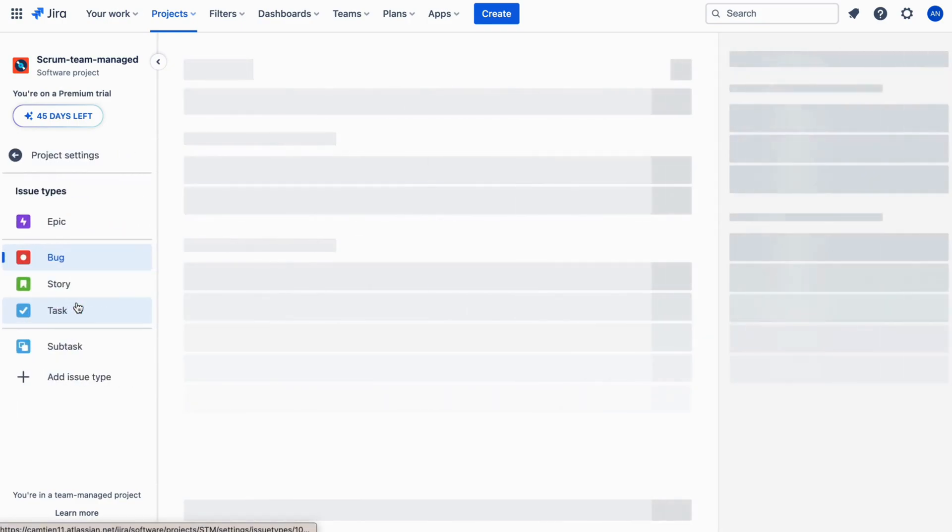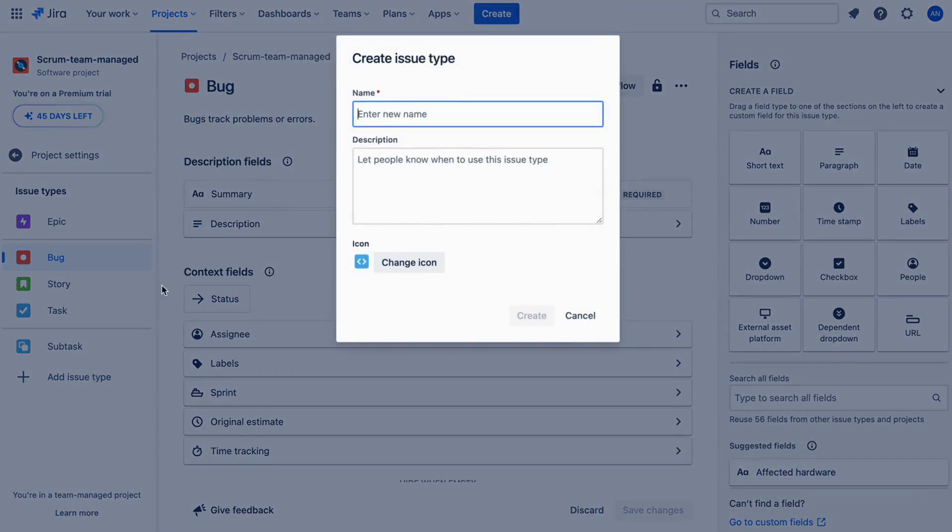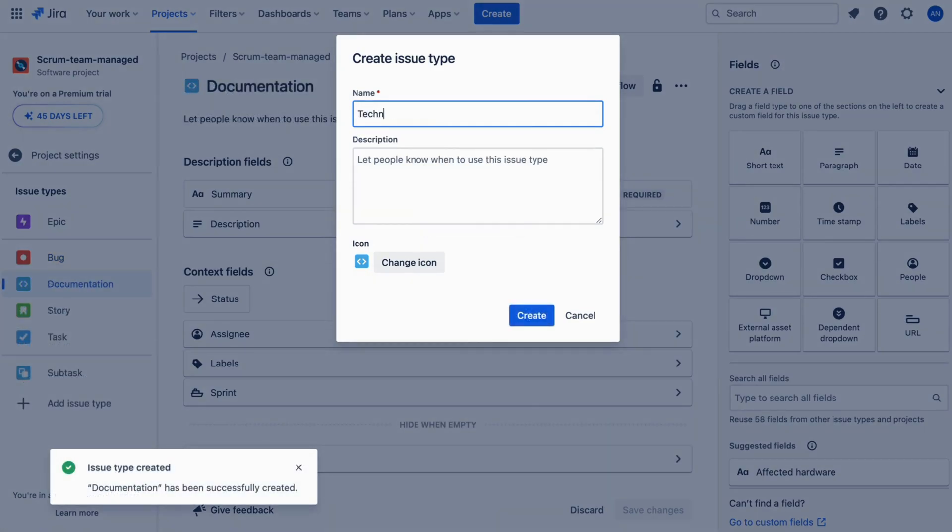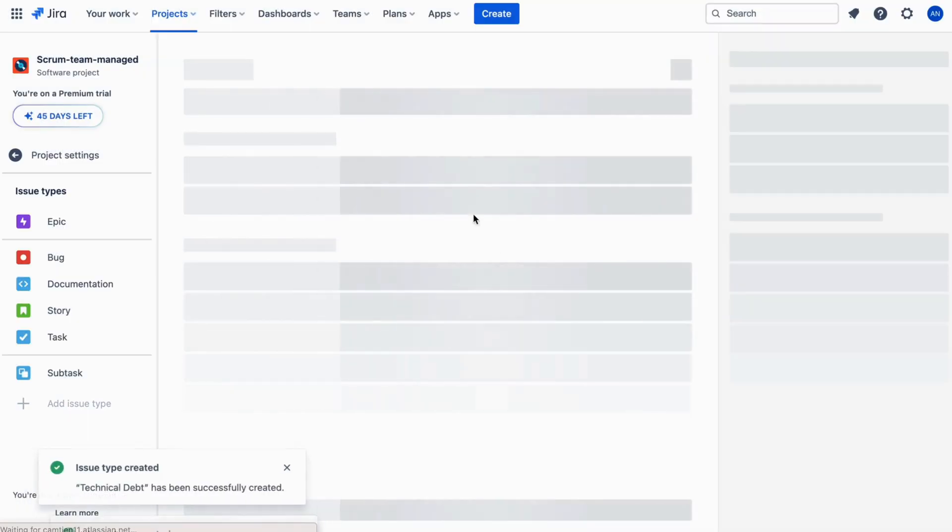Under Issue Types, click on Add Issue Type. For example, you might create a Documentation issue type to manage all the work related to product documentation or a Technical Debt issue type for tracking code refactoring tasks.